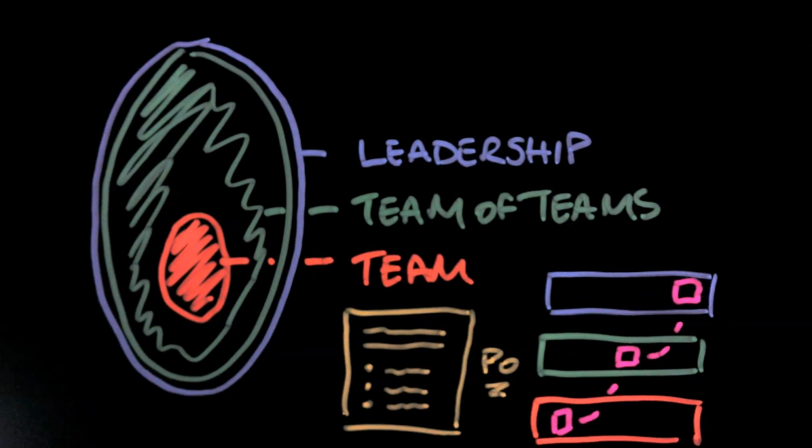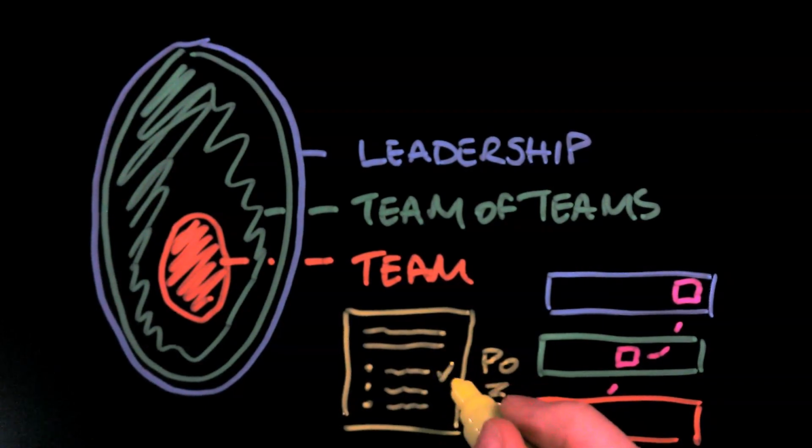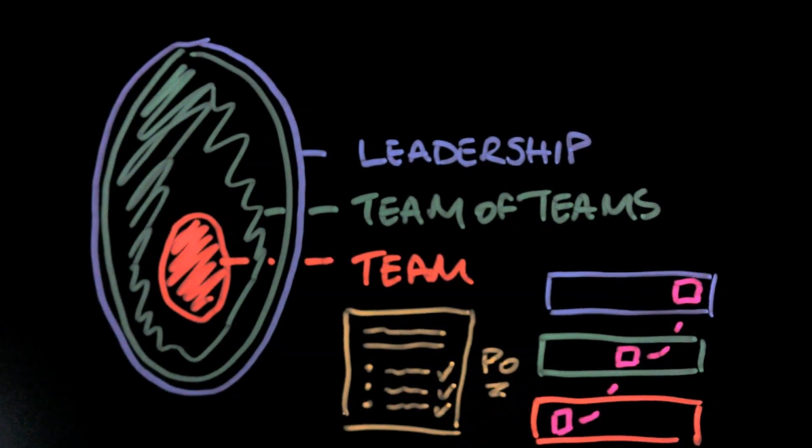If the leadership team or the team of teams level resolves that impediment, they're hopefully meeting each of these acceptance criteria. But as you're the product owner, you're accepting whether this impediment has actually been resolved or not. So you're ensuring that the quality standard of what you receive back is what you're expecting, and if not, it goes back for further resolution. This adds a little bit of quality into the process and a little bit of accountability and ownership as well. This has worked for me in many organizations, and I hope this helps you.